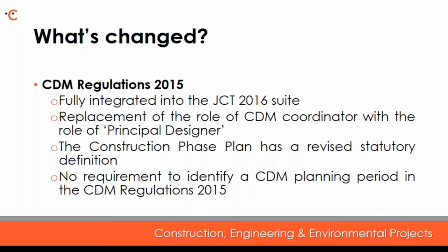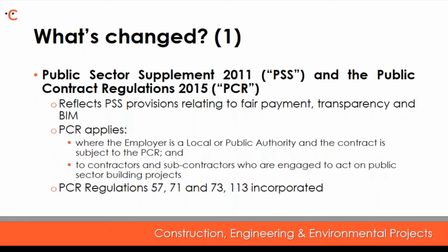Another change is that the construction phase plan, and that's a term defined in the contracts, has a revised statutory definition. As there is no longer a requirement to identify a CDM planning period in the CDM Regulations 2015, this entry in the contract particulars has now been removed.